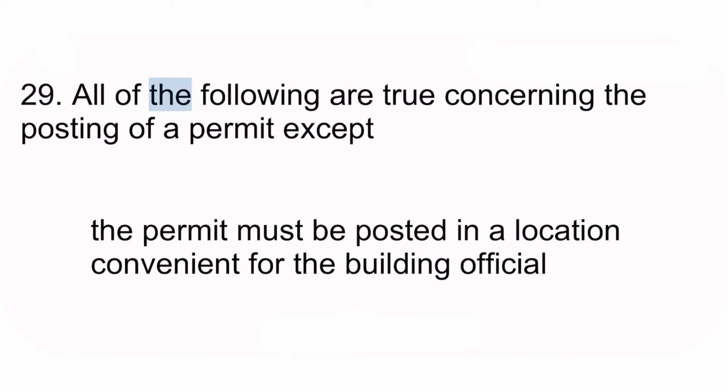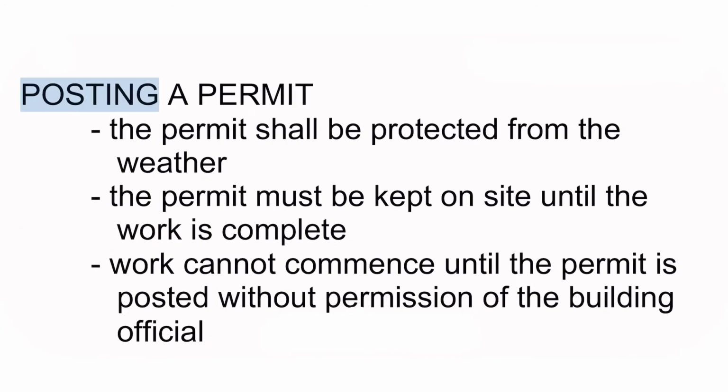29. All of the following are true concerning the posting of a permit except: the permit must be posted in a location convenient for the building official. The permit shall be protected from the weather. The permit must be kept on site until the work is complete. Work cannot commence until the permit is posted without permission of the building official.